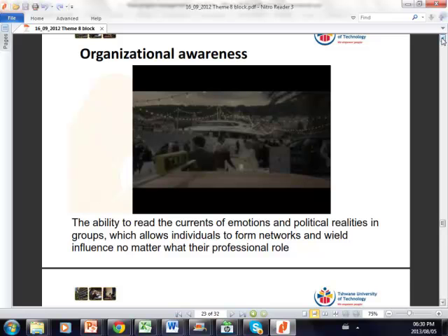Why? Because you were not organizationally aware. You did not know who in the organization is talking about the projects at the moment, what projects are important for the organization at the moment, what the organizational strategies are. Okay, so that is somebody who is an organizational ostrich, if we can put it like that. Because their head is in the bucket or in the sand, and they do what they're doing perfectly, but they're not aware that there's actually an organization in which this project is happening.